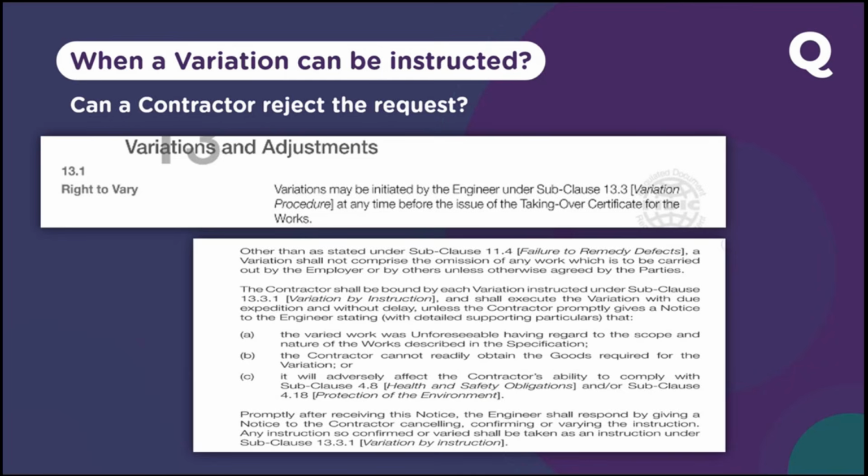As a contractor, do you ever anticipate such a sculpture or structure to be installed on top of that building? So maybe your structural design you should change, maybe your BMU you should change. Many elements, maybe the foundation, you should change because you never anticipated such a big structural element coming on top of it. If it's a luxury or prestige building, I may say the client may be adding extra items to make it look good, maybe extra pergola or extra facades. But for a normal subsidized building, as a contractor, you will never anticipate adding such a premium sculpture or structural element on top of the building. So you can say straight away, no, I never anticipated such a requirement on the top of the building or any part of the building.